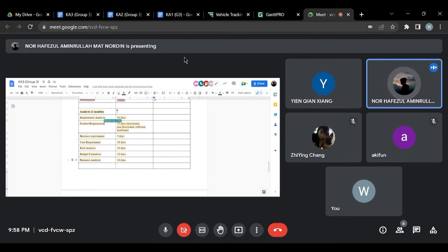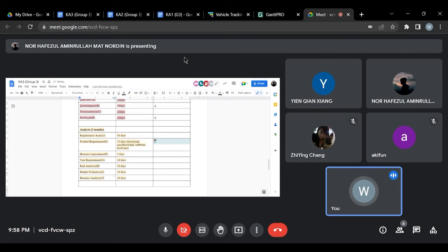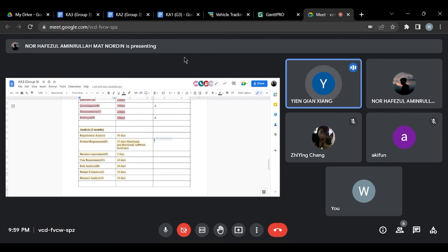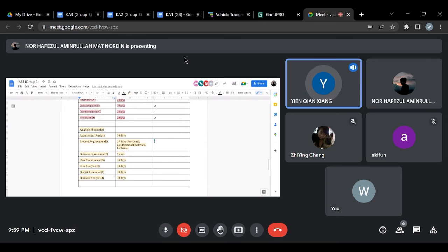Business, user, risk, budget. The product requirement must be done after all the requirement gathering techniques are done. Hello, manager, can you hear me?